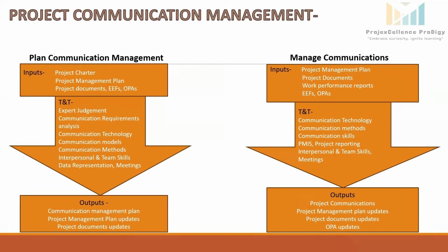PMIS, Project Management Information System. So various tools like dashboards, email, and document sharing platforms are used to store and distribute the information. For example, the site team updates the installation progress in a project management tool, which automatically generates the report for stakeholders. Project reporting. It generates progress reports, dashboards, and presentations tailored to different stakeholder needs.